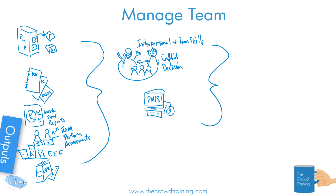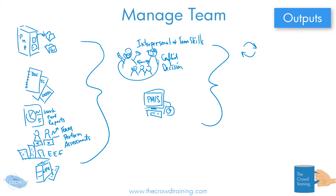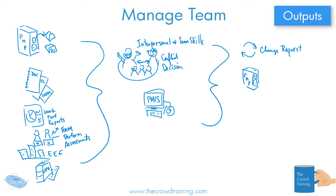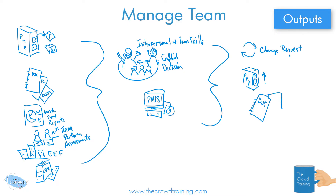Now the outputs. Sometimes if things are not working how they should be, you're going to have to request some changes — so change requests is one. Another one is updates to the project management plan. As the team is working or not working, that will be reflected in the plans. Maybe it changes the schedules, or the plan of what resources or the amount of resources we need — too many, not enough, need to pull them from elsewhere, different skill sets. That might also change the documents, like the resource calendar or lessons learned. So that's the plan updates and the document updates.